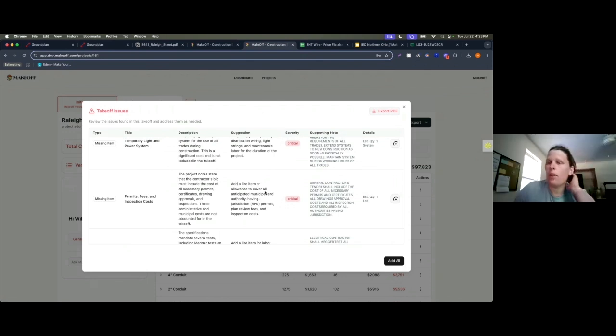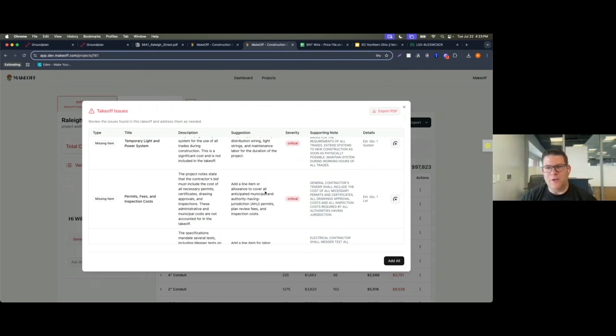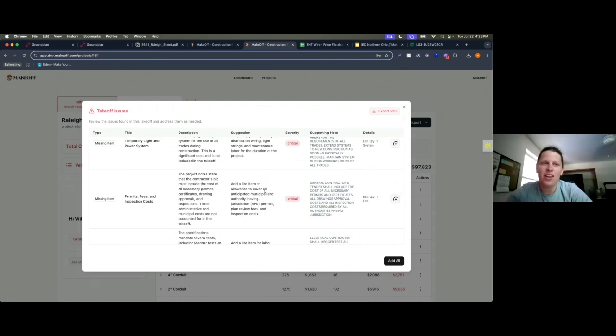Yeah. Normally when I read through specs, I'll color code them, and if it is something that I would normally hit just by being a good electrician, then I don't flag the note at all. So if it's something like do work according to the NEC, or make sure your wire size is right, I just ignore them because I'm not a bad electrician. Don't suck at your job. Yeah, I don't suck at my job.